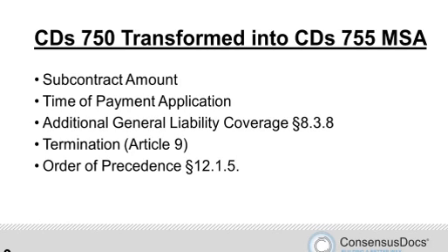So you'll see, in the event of a subcontractor default, the ability of the constructor to terminate, if appropriate, the master altogether or just the project work order.